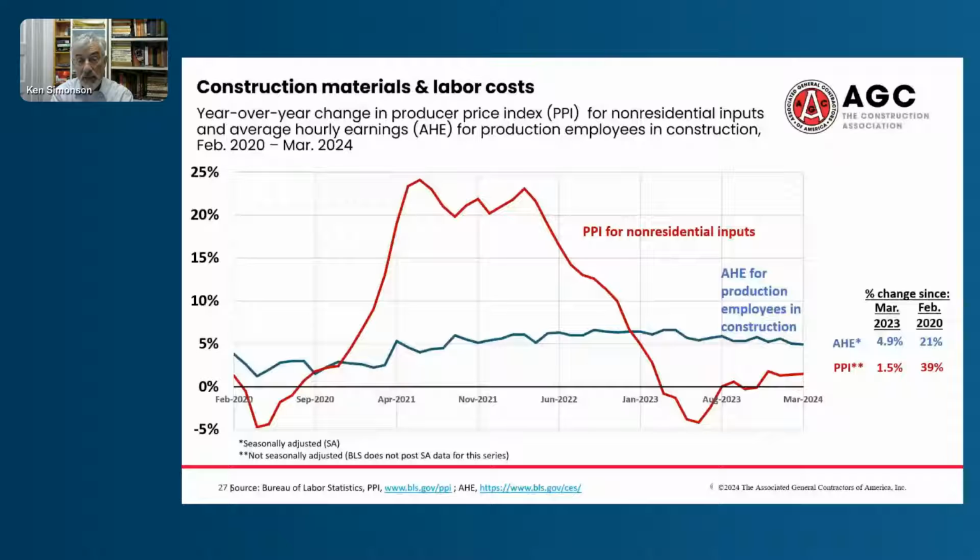Now, going forward, I think that we will see gradual acceleration of materials costs, not across the board and not into double digits, unless we have some extreme event happening. But I am worried about cement shortages like those that showed up in 2022. We're already seeing fairly steady increases in cement prices. And more recently, wall insulation has been very difficult to get if you're looking for mineral wool insulation. And those prices, I think, are also rising.